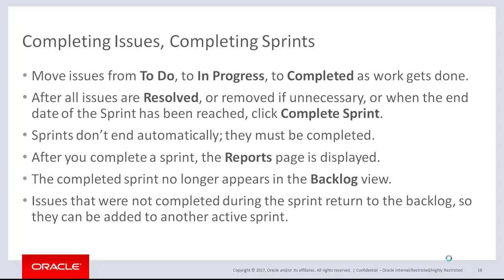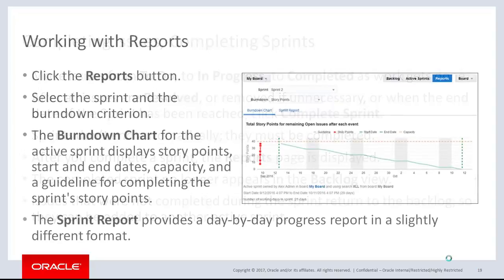When you complete a sprint, the reports page displays. The completed sprint isn't shown in the backlog view anymore. Uncompleted issues return to the backlog so they can be added to another active sprint.